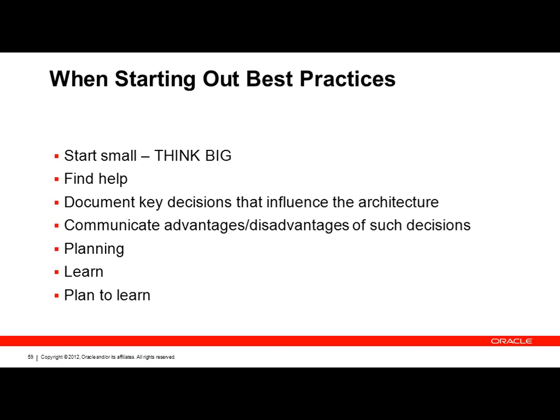Put time into your project management plan that actually says, okay, we're going to spend a little bit of time building a small application here or learning how to use ADF libraries or how to do build management with Maven or a continuous integration server. Don't just leave these off your plan. Again, these large sophisticated frameworks like ADF and other J2EE frameworks require that you have a lot of skills and in-house infrastructure. You need to plan and put time into your projects in order to work towards a successful project build.